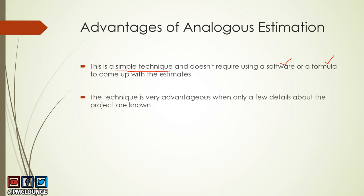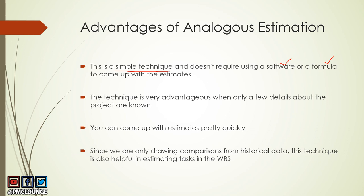This technique is also very advantageous when only a few details about the project are known. By drawing comparisons you can still come up with estimates, and you can do so pretty quickly since there are no formulas or calculations involved. This technique is also helpful in estimating tasks in the WBS — you can look at similar tasks performed in previous projects and do analogous estimation right away.